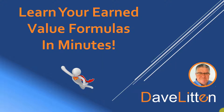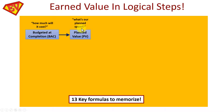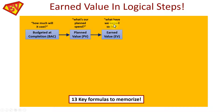There are 13 key formulas to memorize. The first metric is how much your project will cost — called Budgeted at Completion, or BAC — normally given in any question. Next is Planned Value (PV): what is our planned spend at a point in time, such as the end of a stage or work package. Any earned value question will set the scene of the whole project, then give a snapshot at a certain point. Next is Earned Value (EV): what have we earned so far.